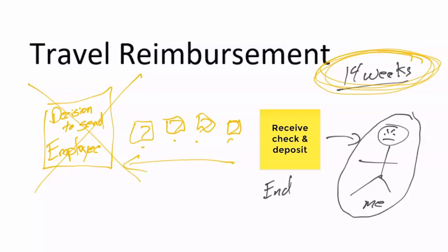And so with this new information, our team had to go back to the drawing board. The reason why I start the story out this way is that most process improvement projects and process improvement teams have early scoping questions. And when you're forced into scoping down or trying to reduce the amount that you will be investigating or the time spent on that investigation, we want to move the first step to as close as possible to the last step, but it has to satisfy a couple of conditions. It has to still contain all of the necessary steps to create the output that we're looking for.